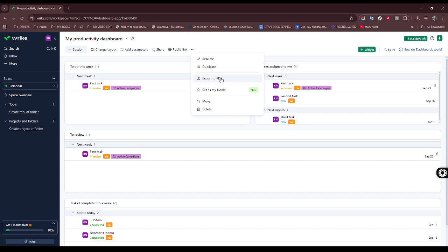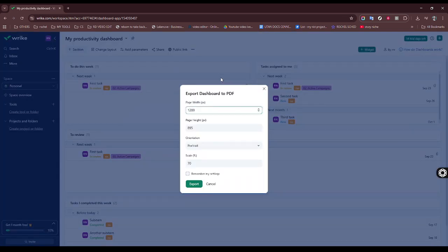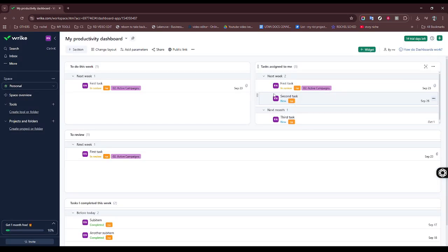After uploading, the next step is where some finesse comes into play. Mapping your Excel columns to Wrike fields. This means aligning the data from your Excel file with the corresponding fields in Wrike so that all tasks, dates, priorities, and other details are correctly synchronized. Carefully go through each column, matching them to ensure accuracy. This can be a bit like solving a puzzle, but taking your time here ensures that all data lands exactly where it should once it's in Wrike.